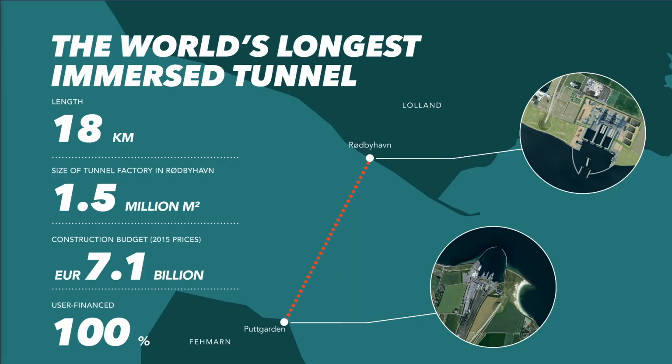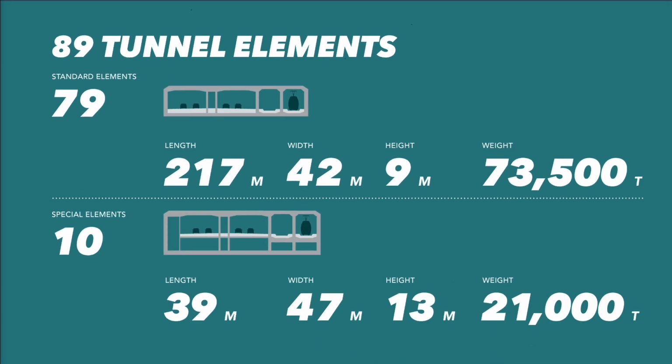So the project is 18 kilometers, the world's longest immersed tunnel so far. It is made up of 89 tunnel elements, divided into 2 main categories. 79 are standard elements, 217 meters in length, and 10 are special elements that have, as you can see here from the sketch, a basement with the technical rooms that are used to operate the tunnel.